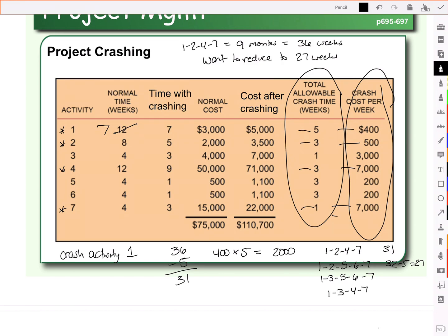So we go 1, 3, 5, 6, 7. Before, 1, 3, 5, 6, 7 took 7 months. So 28 weeks. And we just shaved 5 weeks off of activity 1. So it's now taking 23.